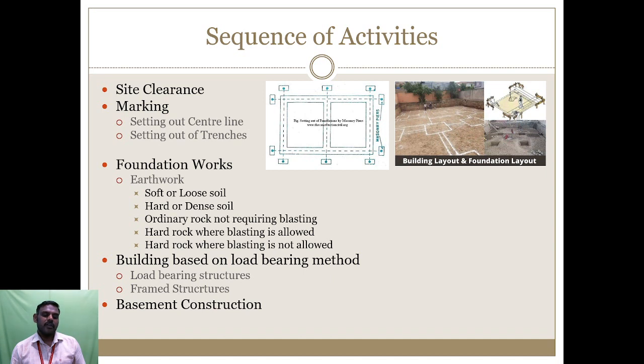Hard rock where blasting is allowed means that near the site there are no constructions. If there is any construction that could be damaged during blasting, it's not allowed. The next heading is hard rock where blasting is not allowed.